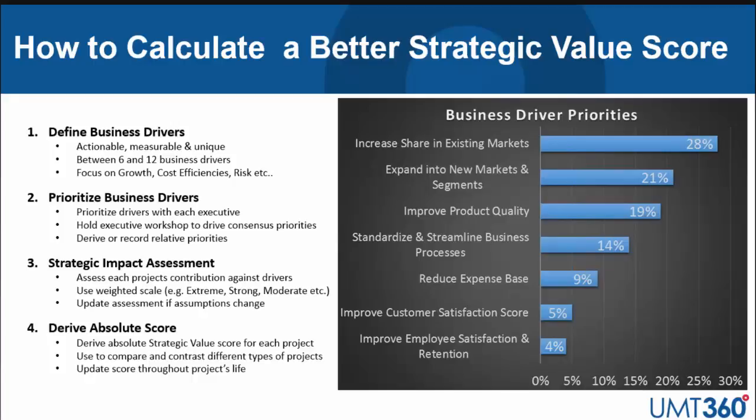So having set and prioritized a strategy, which is a key input into the process, we need a way of assessing a project's contribution to that strategy. And you can do so by establishing what we call impact statements to understand the extent a project will contribute to one or more business drivers, and it can contribute to more.